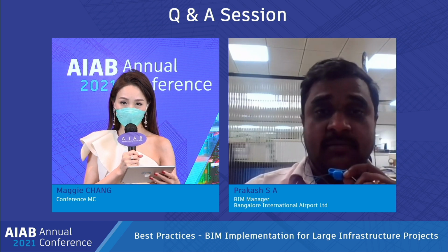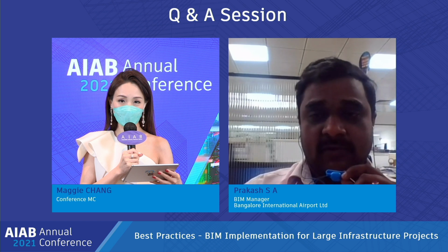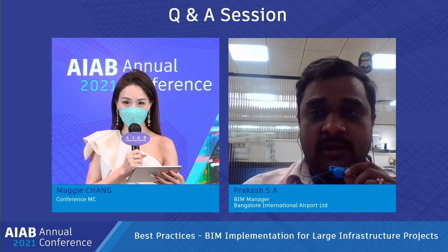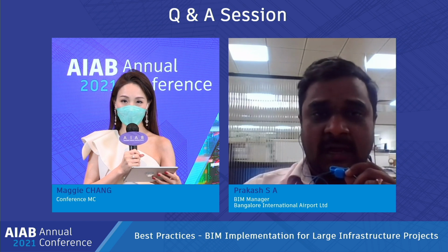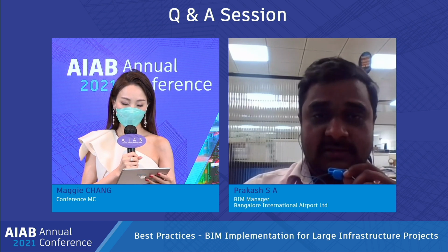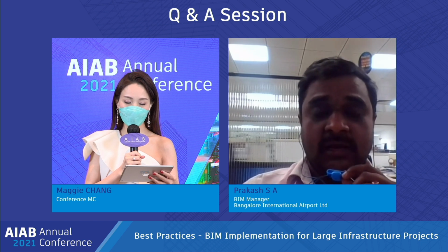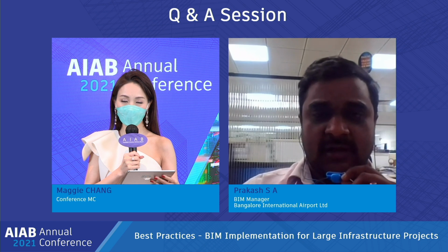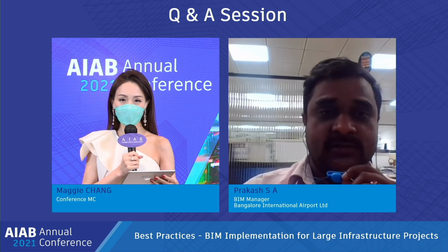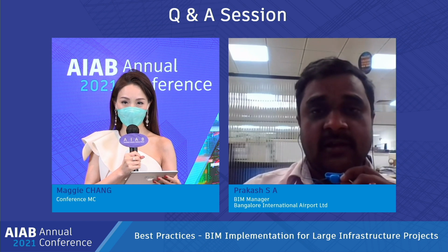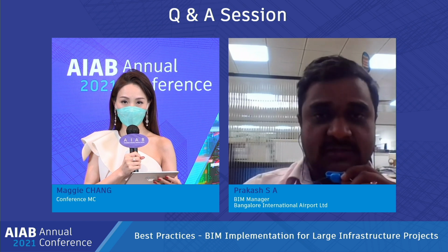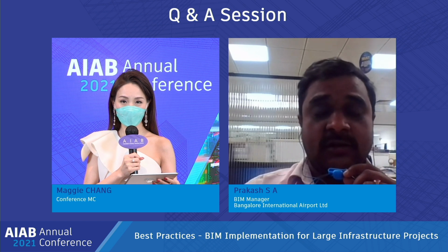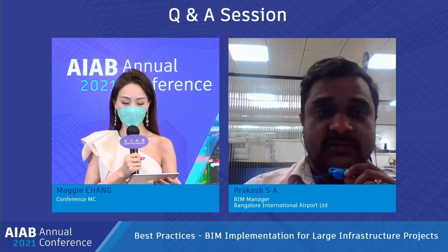Suppose, for example, I'll take the airport authority approvals. All the approvals we completed using the BIM platform, so the time taken is very little. This was one impact: taking the approvals from all the stakeholders, the Airport Authority of India and the PICAS approvals. We handled all of that through the BIM implementation, and it worked very well. It reduced the time by almost 6 months.